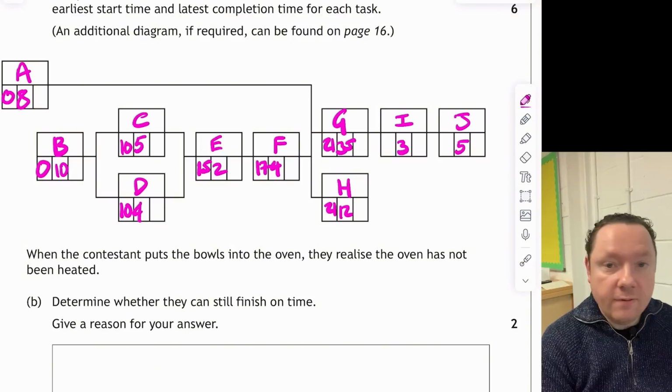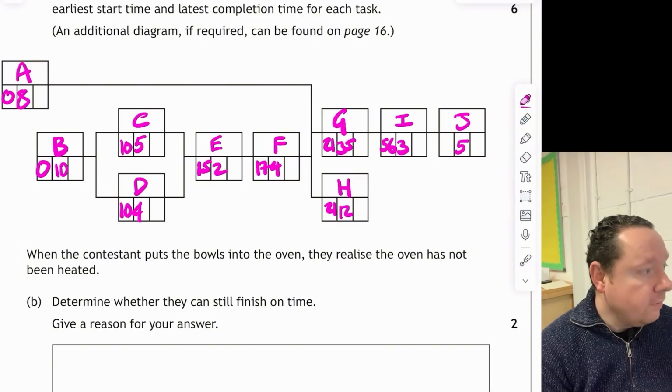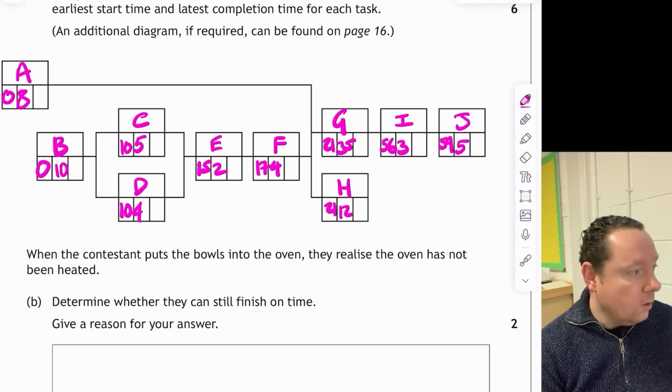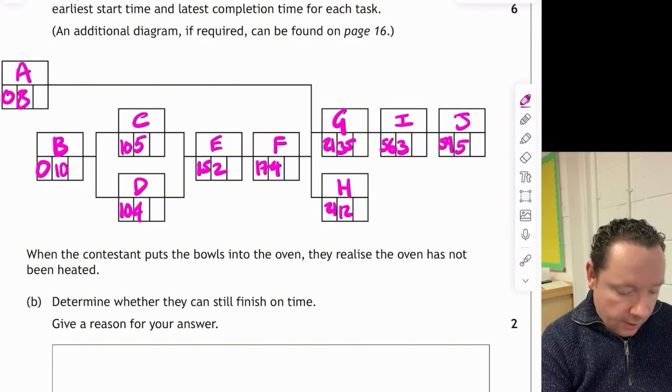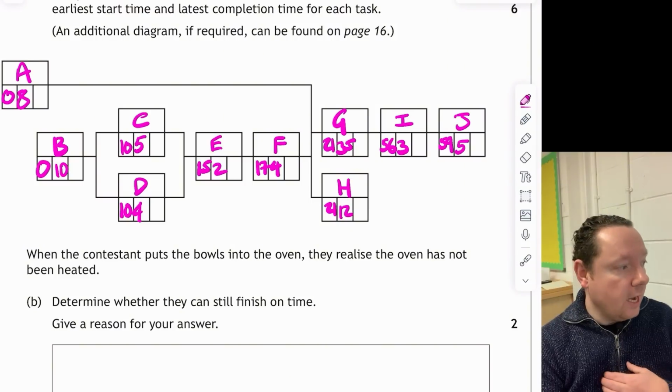21 and 35 is 56. So that'll be in I's. 56 and 3 is 59. So that'll be in J's. And down below, you've got 21 and 12. We've already done that one, so we've done the forward scan. So let's now do the backward scan.